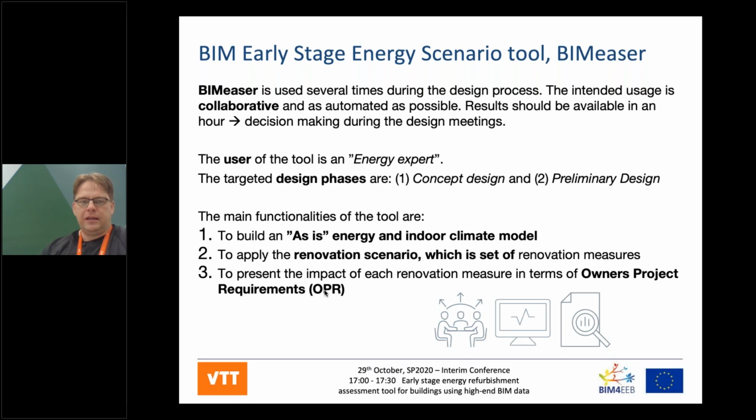The main functionalities of the tool are to build an as-is model, so how the building is when the renovation project is started. That's the basis, of course. Then we apply some renovation scenarios. Those are the set of individual measures that are applied to the building, or considered, that maybe we could change windows, and maybe we could add some insulation, or maybe we could add some photovoltaic panels.